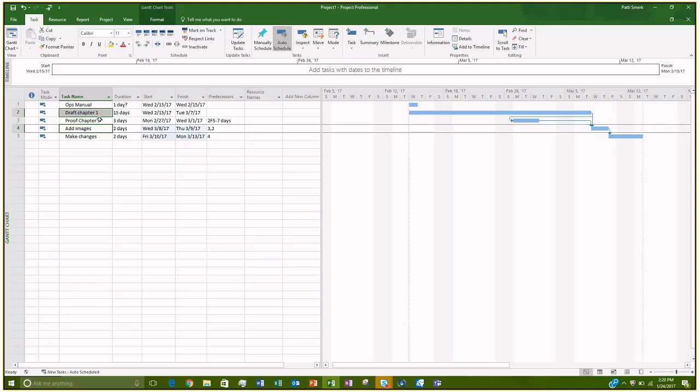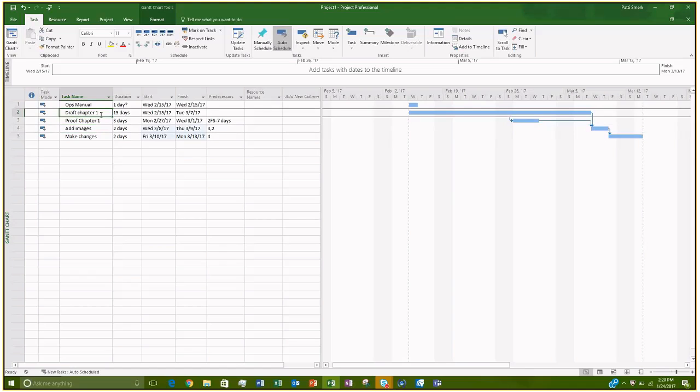If you forget about the little control trick to skip over a task, that's just instead of clicking and dragging, if you wanted to skip a row, you just hold down control. If you forget that, you can always just type in the task number in the predecessor column. That's fine. Just separate them with commas.